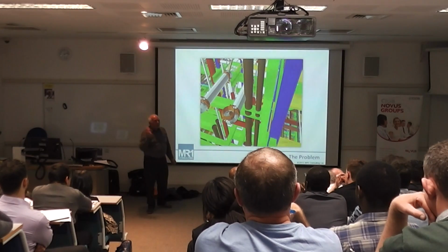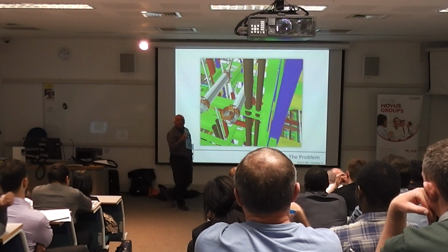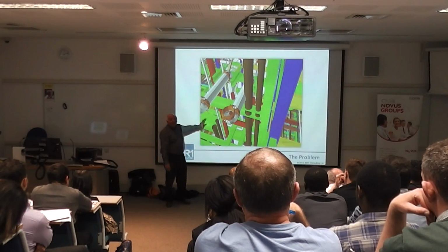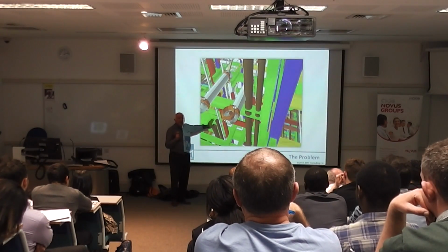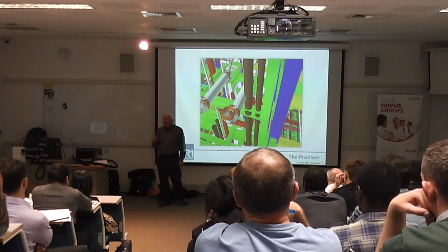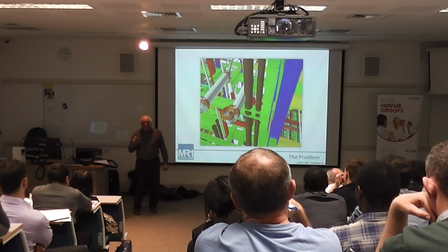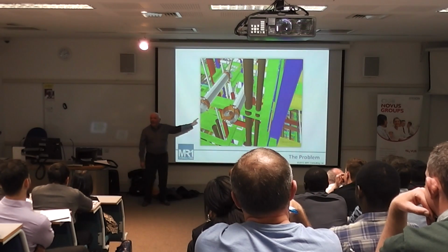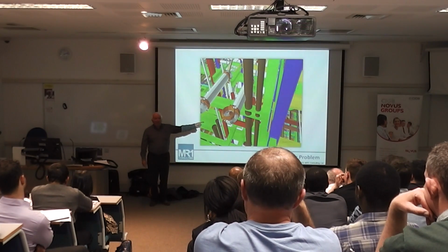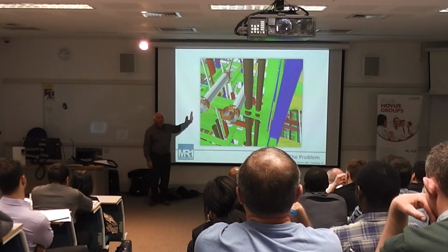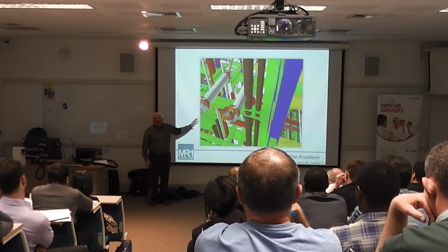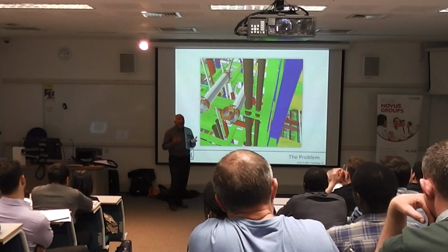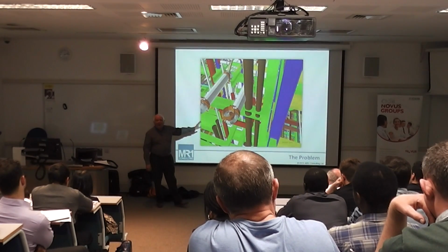So even though we put the processes, the methodology together on Terminal 5, and we trained everybody to do it, this occurred. And what we did at Terminal 5 was use clash detection to find out who the people were that were not following the process, not for clash detection. Because we knew if they followed the process, this would not occur. The processes that we're pushing out in the collaborative activity is about clash avoidance, not about clash detection.